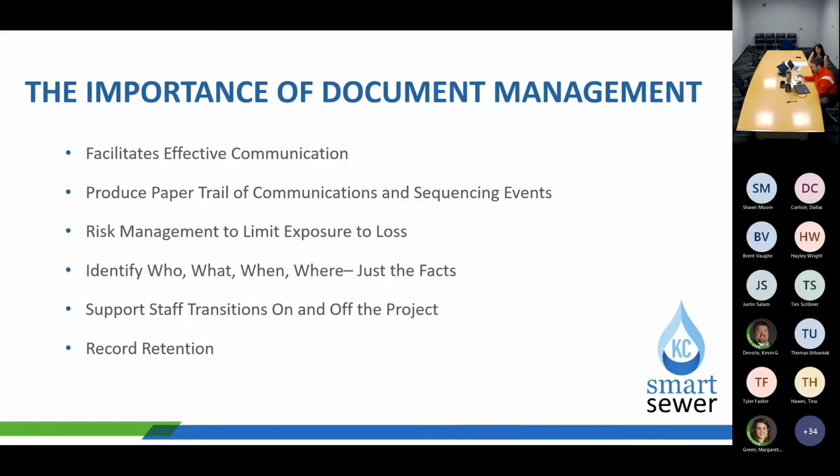All right, so we know with communication, you always want to make sure and put that on your daily report as well. So when it comes to producing that paper trail, when you communicate with somebody verbally on the phone and you are trying to be in communication with them repetitively, you actually get that email and put it in that email, and then also put that on your daily report. Hey, I produced this email on this day.